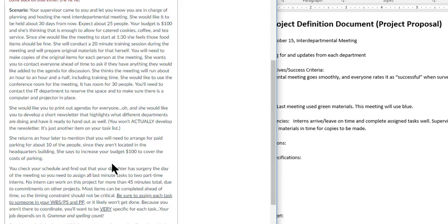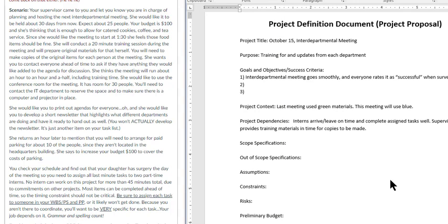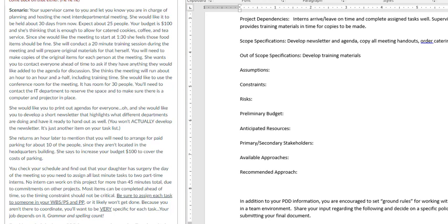All you're responsible for is copying them. She also very clearly states that she would like you to cater materials or food, so that is within scope. Making homemade brownies would be out of scope and it would be inappropriate because you've been told to complete the task in a different way.